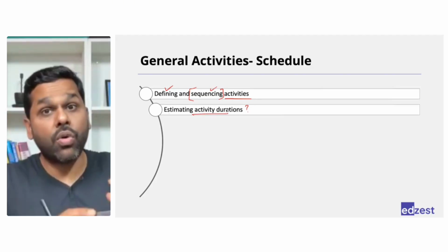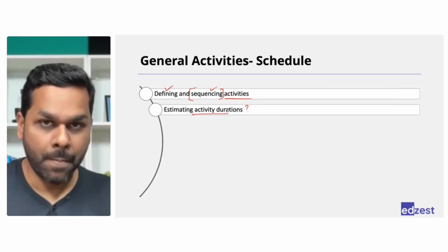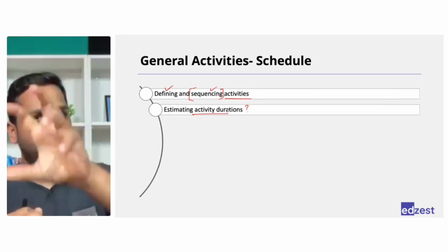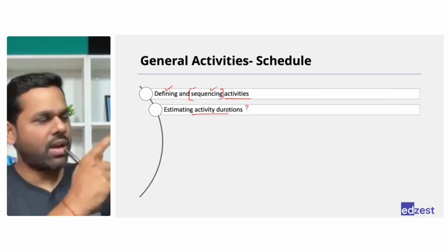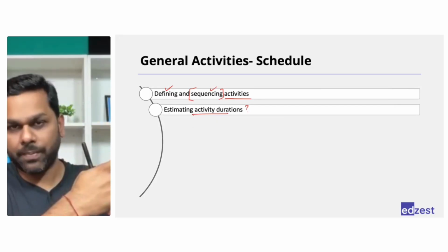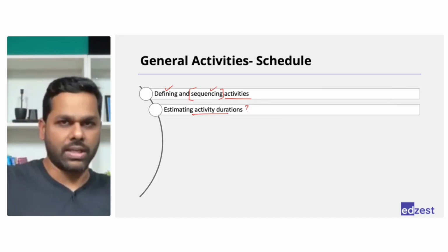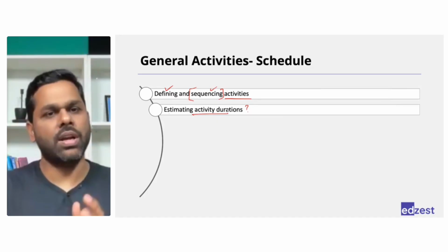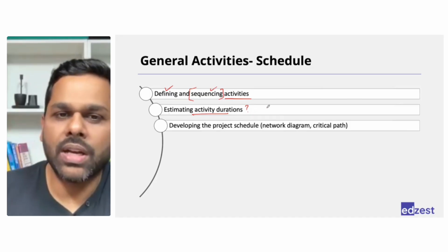Now, when you are estimating the whole project, you may use another technique called bottom-up estimating. Right? Wherein, for bottom-up estimating, you go to the work package level, and for the work package, you are again using the same techniques: analogous, parametric, and 3-point. But what you do with bottom-up is you always focus on the complete project and you add your estimate for every work package and you get the estimate for the complete project. Right? When you get the duration,